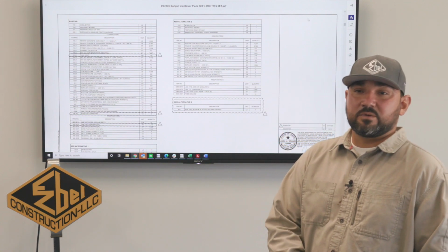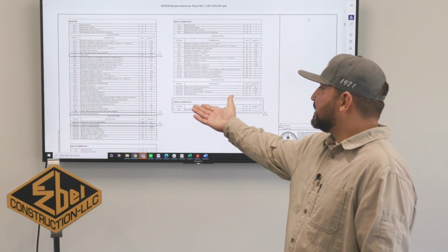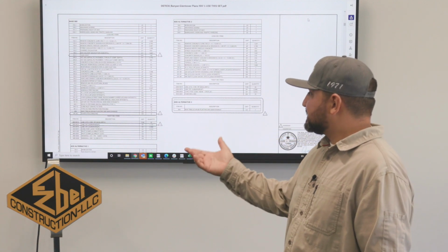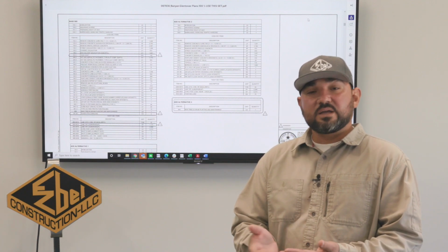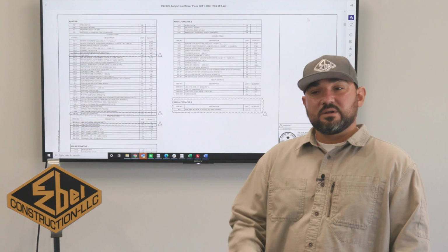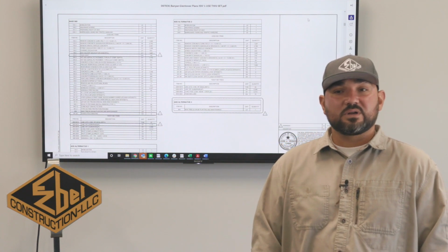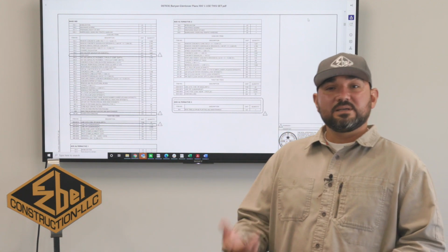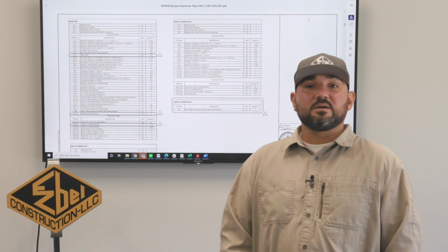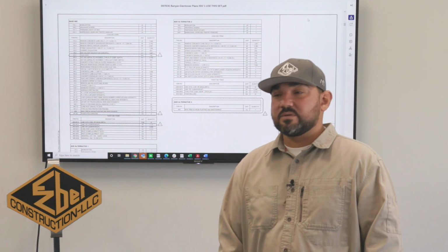You go back to the number here, for instance, if we're doing 503.1, which is Portland cement concrete driveway, you're going to go back to your specification book, look up page number 503.1, and starting from that page, read through those three or four pages, whatever it is, to be able to know how to construct it, how to build it, how you get paid, and how you're going to wreck it and cure it. It'll explain everything on that number there.